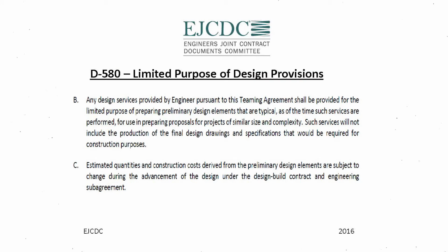One of the things I want to talk quickly about is some of these liability terms that are included in the teaming agreement. What we're saying here is that the design that we're providing is for the limited purposes of providing this proposal technical form. The intention of the document is not to construct or to use this for any sort of building operations. As you know, a lot of times owners will require even these early plans that you submit with a proposal to be signed and sealed by an engineer. And it's important that there be no mistake that those are not intended to be for construction, or that they're providing a final set of technical documents.